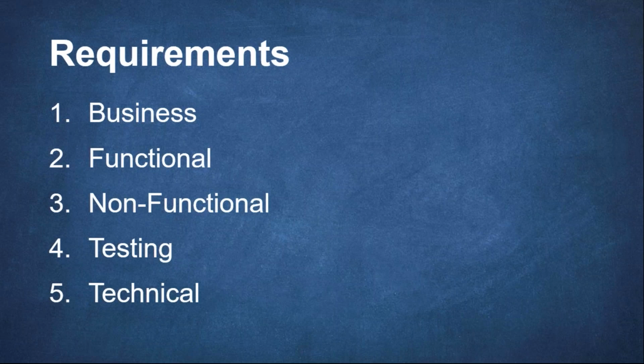What I see frequently is I'll ask an end user or stakeholder for a business requirement, and they'll say, I want a drop-down box. A drop-down box isn't a business requirement. That can fit into number 2, into a functional requirement. How do we accomplish something? But our goal when we start gathering these requirements, when we start doing the interviews and asking the questions, is to understand what the overlying strategy and goal is, what the solutions should look like at the end of the process.